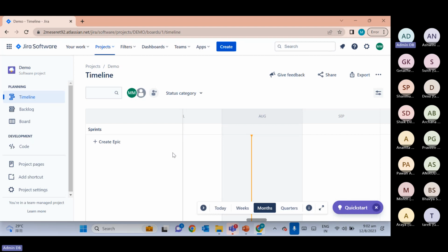One business task can also have multiple API stories. Let's say in one business requirement, we need 5 APIs. So he will create 5 stories, like 3 for system API, 1 for process, 1 for experience. That lead will create them, and then the Scrum Master will do coordination between the business and the API lead, and help identify how many stories should be delivered in this sprint.